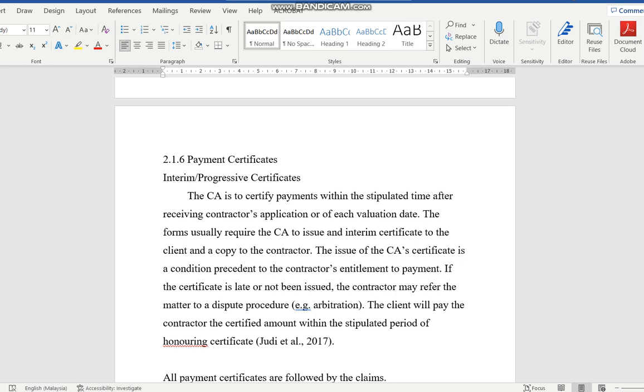So you put an estimated sum first, so that both provisional and prime cost, you still put an estimated sum first, but both will be subjected to what you really get at the end of the day. So at the end of the day, if you use a Chinese valve or a Japanese valve, or a butterfly valve from US, then the model, the thing are all fixed already, then you pay. Once it's installed, then you pay.